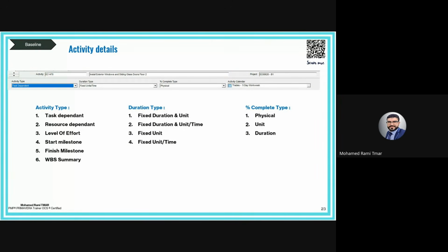The top management or the sponsor will not need to go through the details to read, for example, 50 or 100 pages of schedule. They will check the first page, which includes milestones, and it will give them the real picture of the milestone status. And if there is any contractual milestone or intermediate milestone defined in the contract, it needs to be clearly defined and created as a milestone in our schedule.